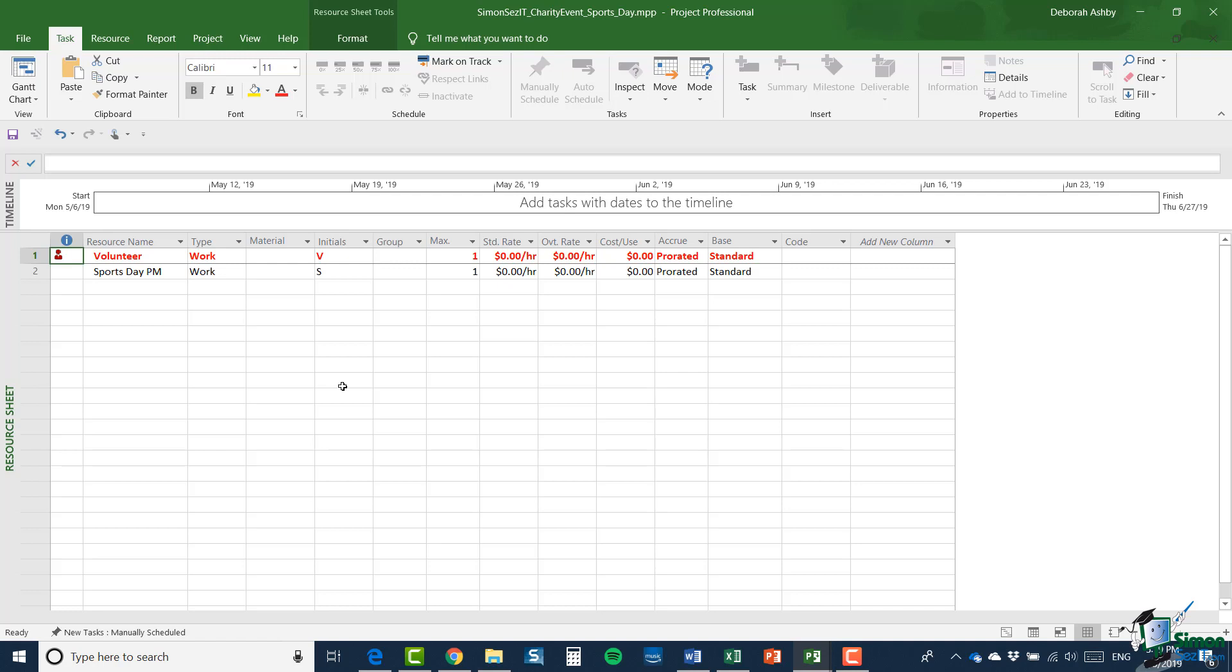And so you can see, for example, here, one consequence of that is that the volunteer resource already seems to be over allocated because when it creates the resource sheet, it defaults to creating a max of one resource. And if we looked at the resources already allocated in the original project, we would see that within the sports day and barbecue summary task, we already have more than one volunteer assigned tasks.